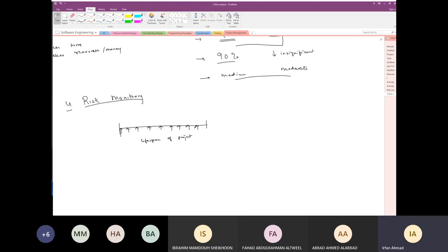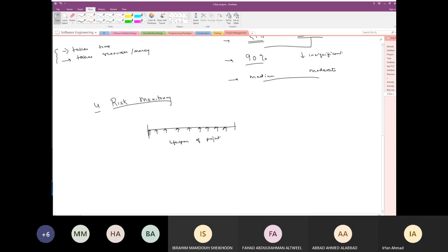So things change. And because things change, you also update your plan, right? How you're going to deal with those risks, which I guess makes very common sense, right? Because the risk analysis gives you a different result now, your planning has to be modified. And this process has to go throughout the project. You continuously monitor the project, you continuously reanalyze the project, you continuously update your risk plan.